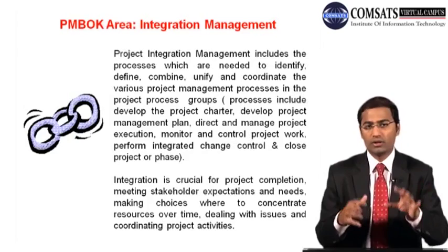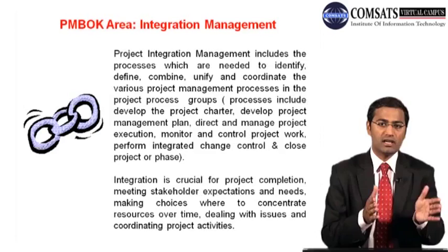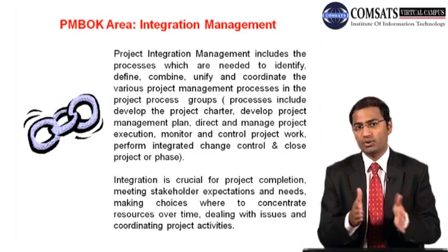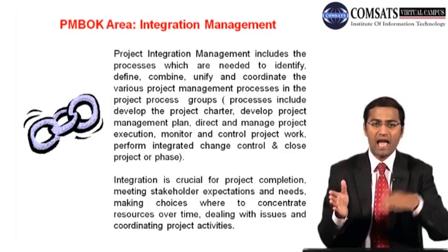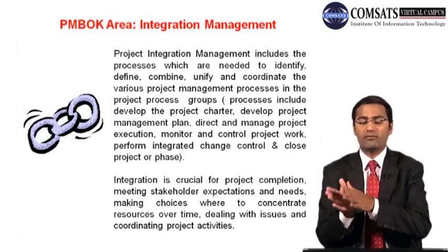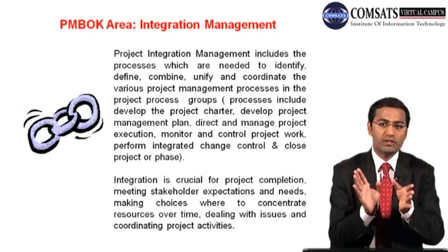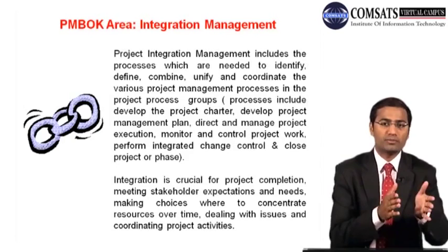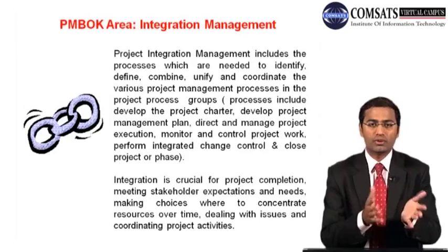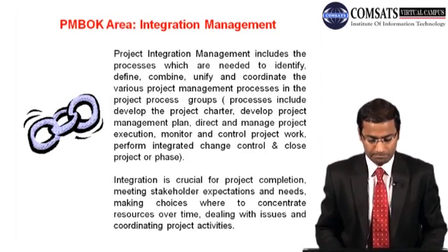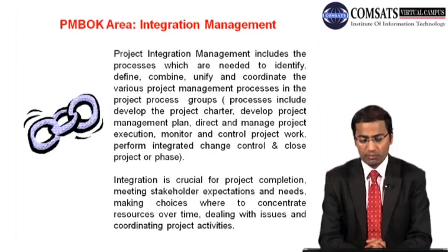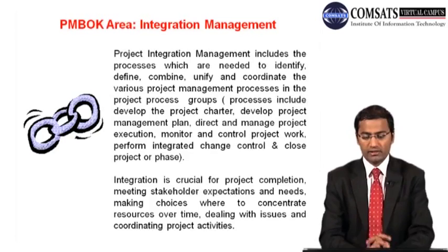And then within those phases, you can actually have further sub phases. So whenever you complete one phase, you actually follow the same procedure. So there is a difference between a simple project and a complex project. In a simple project, you close the project, whereas in a complex project you are closing the phases. In the same manner, you are treating your phases as complete projects. So projects are divided into phases to take care of the complexity inherent in the characteristics of the project. So integration is crucial for project completion, meeting stakeholder expectations and needs, making choices where to concentrate resources over time, dealing with issues and coordinating project activities.